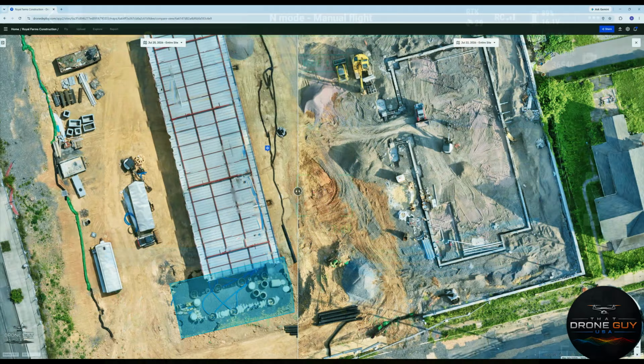Construction progress monitoring provides more than pictures. It creates accountability. Construction schedules, subcontractor reports, change orders, and payment requests can all be compared against independently collected project documentation. Owners and project managers gain an objective record of completed work, work in progress, and areas requiring additional attention before they become costly problems. Perhaps most importantly, every site visit preserves a permanent record of existing conditions before they change.